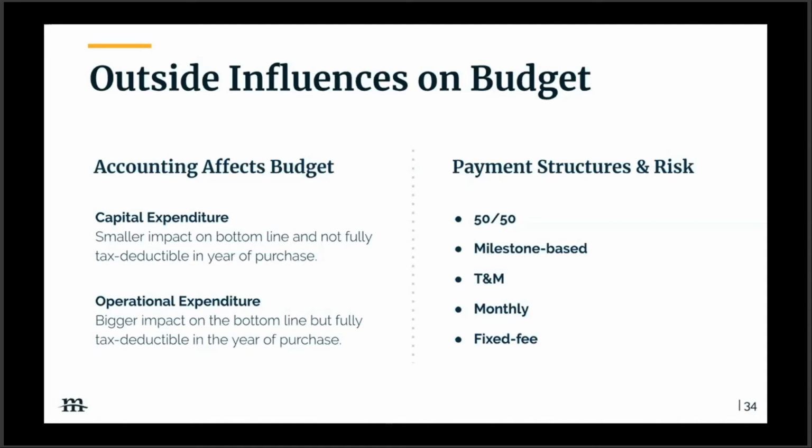Paul, is there anything you want to add to this? Yeah. So fixed fee usually puts the highest degree of risk on the implementation partner, and there's a very low degree of risk on the buyer. And what we've seen happen during fixed fee projects is there has to be so much planning done up front to alleviate that risk on the agency that the project just becomes a waterfall project, and it completely contradicts the principles of Agile.